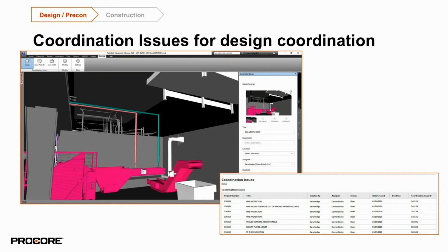Before Procore, drafting was using a combination of saved viewpoints in Navisworks and meeting notes to track accountability. With the plugin, we can easily keep record of not only who is responsible, but who created the issue, when it was created, and any communication that was had in regards to that specific issue. Once the issue is addressed, it is marked as ready for review. It is closed out by a drafting team lead once they have confirmed that the issue is resolved.